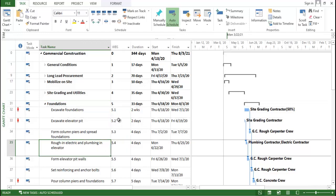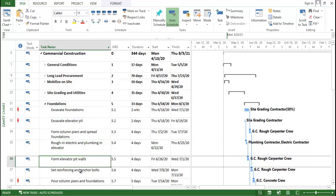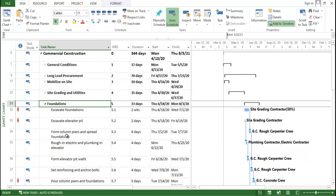You can see the WBS displayed here — for example, 5, 5.1, 5.2 in point format. The WBS functionality helps you identify the amount of resources required for a particular task, and from that you can identify how much cost you are going to incur for each individual activity, giving you a final cost for that task such as foundation.